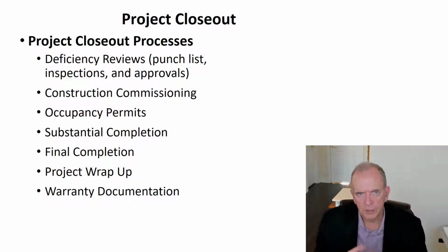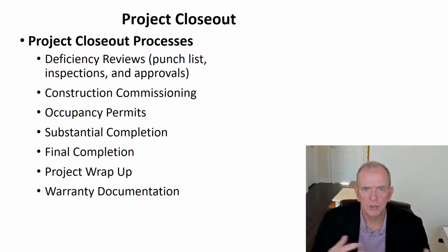I'd want to make sure that information is being gathered so that we have all our ducks in a row when it comes to project closeout, and so that it's like dominoes, they all start to fall in our favor. It takes a lot of effort to do that early on and throughout the project. If you're in the commissioning stages, you want to make sure you've gathered all the proper documentation as the subcontractors were doing the work, and that you know exactly what's going to be tested by the third-party testing agent, and that you've had prior testing so that it'll pass the first time they come, and that you've got a little bit of buffer time in case it doesn't. So all of these things come into play.